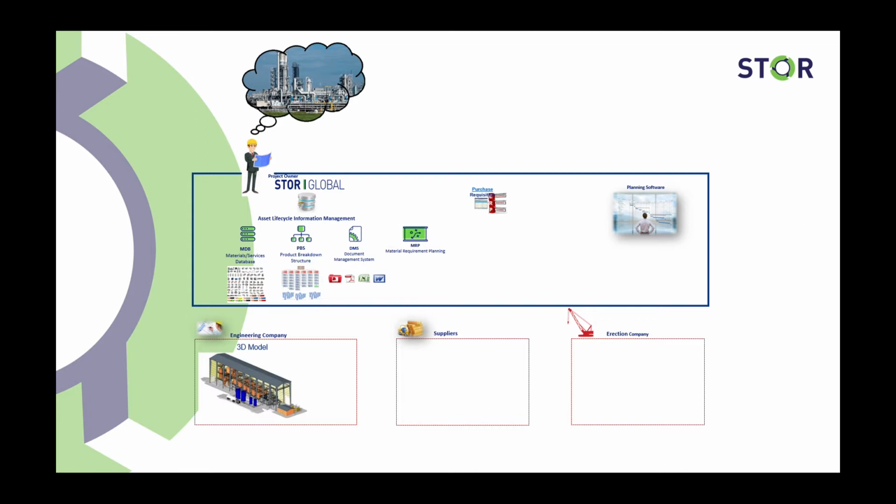The Enterprise Resource Planning System will process the information and will start the process of cost approval. When the cost approval process is made, complying with the project budget, the requisition will turn into a purchase order. The purchase order becomes a document that will be shared with the supplier as a contract for the supply of material, equipment, or service. Having the purchase order, the supplier will execute what's being hired, and once the material is ready